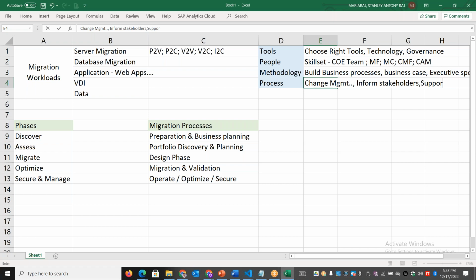Also, whoever is supporting, or the operations team, they need to be informed that we are planning some migration, and what the current issues are on these systems, whether there is any current problem management ticket or any specific issues going on. Because there are chances that the migration team might get blamed when they complete the migration.